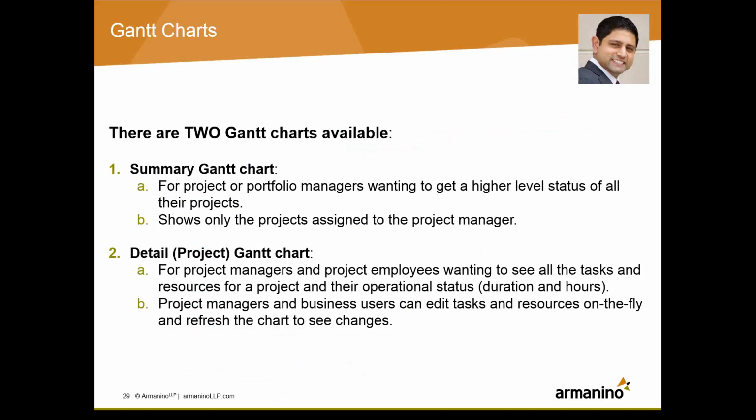This is the ability to actually drill into the duration and the hours and actually look at all the tasks and who's assigned to those tasks. What's really cool about this that's different from some of the other reports, the drill down capabilities allow you to actually edit the tasks and resources on the fly. So nice to be able to do that instead of duplicating your tab and going into another tab and actually editing those tasks. You can actually do it on the fly.